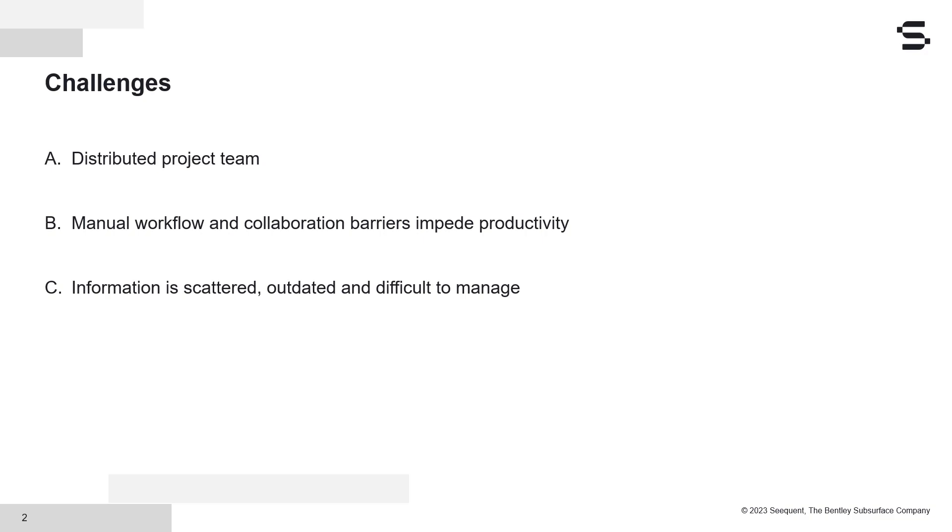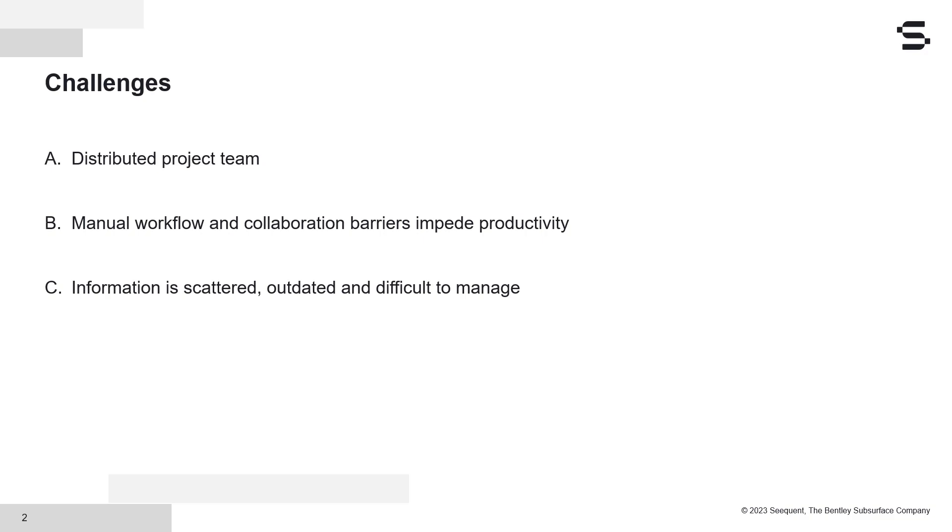Another challenge is that for exchange of critical information, project teams depend heavily on manual and inconsistent workflows. If the people involved are at different locations or from different disciplines or organizations, then the manual workflow increases the time and cost of the project.